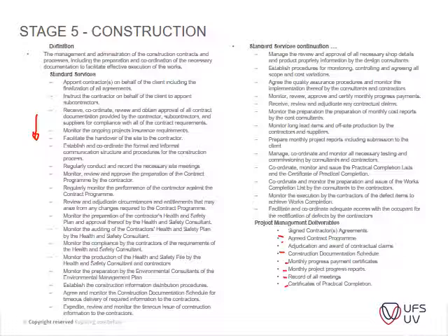Simple things like the dates on when drawings are issued. For if the contractor makes a mistake, perhaps on levels, you can see, okay, did he do it according to the drawing? Did he work on the latest drawing or not? Small items like that is very important. So bookkeeping, administration is extremely important on any project.